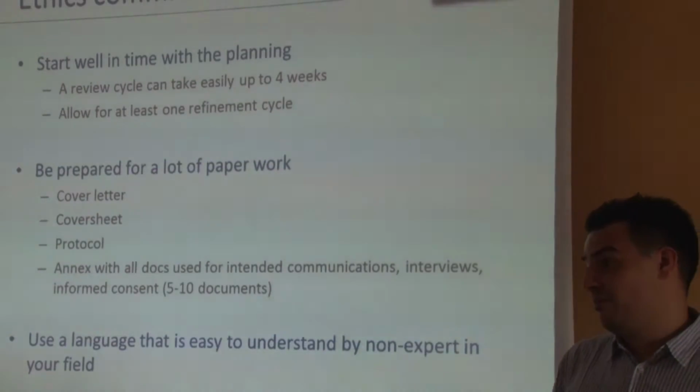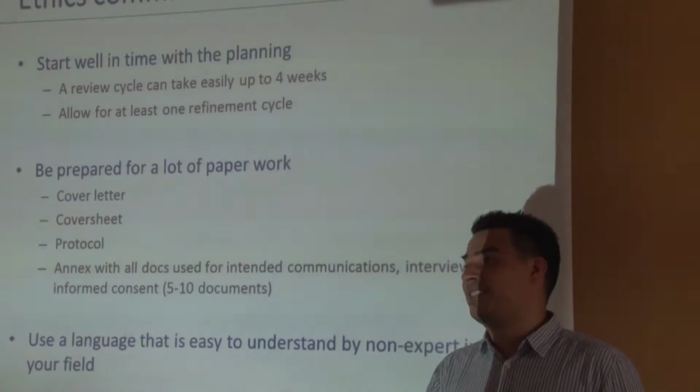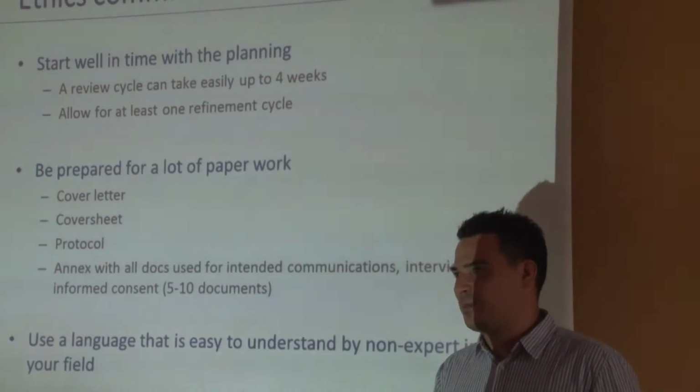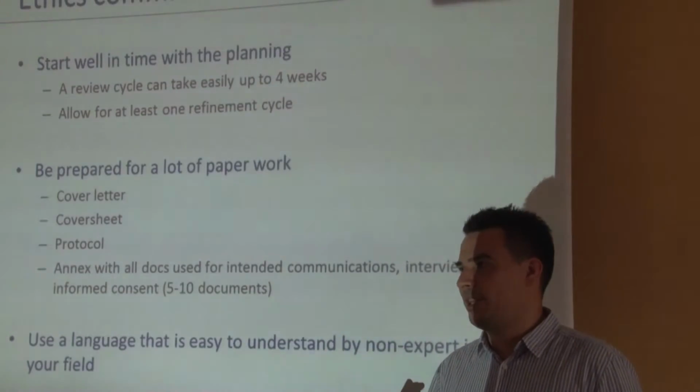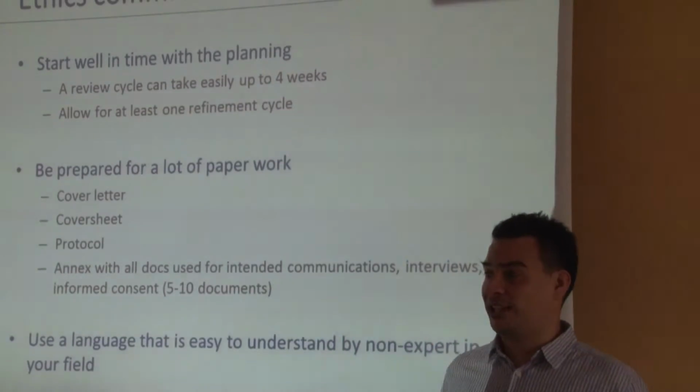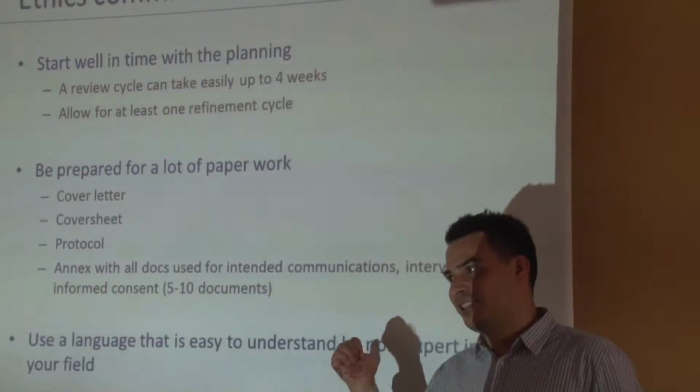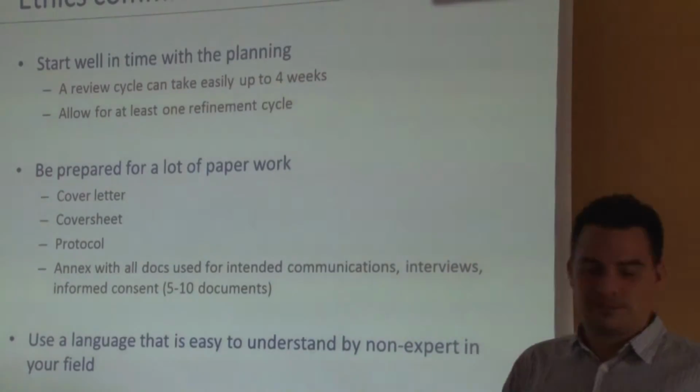And obviously, my experience is you will always get some comments back. So don't expect a perfect submission at the beginning. So at least allow for one cycle to be carried out. Usually if it's a minor change, you get quick feedback as well, but 6 weeks or something like this is something that you have to consider.